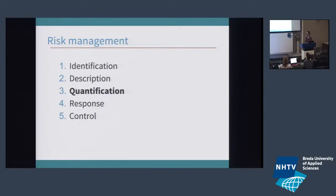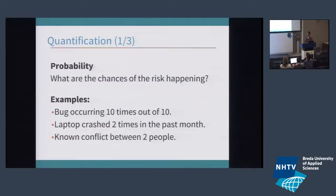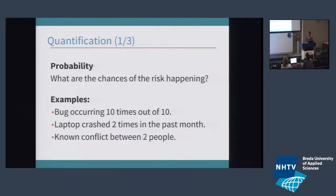After describing the risk, you want to give it some kind of quantification so you can compare risks with others. There are three parts to quantifying a risk. One is the probability of it happening. Godzilla might run over your studio — it might be a risk — but the probability is so low that it's not really interesting to manage. But if you have critical bugs or performance problems and you find out that 8 out of 10 people have them, that makes the priority higher.